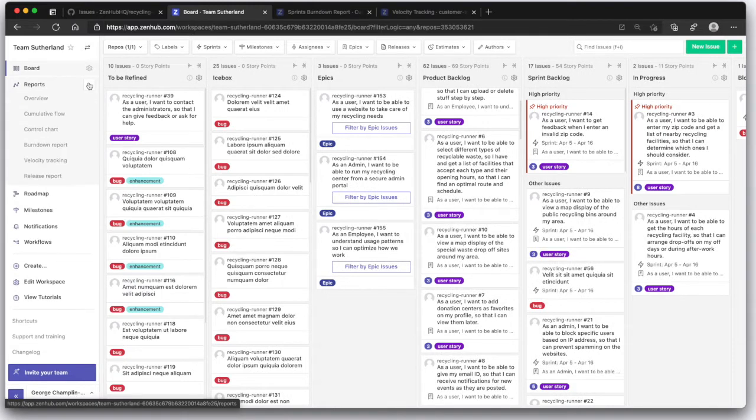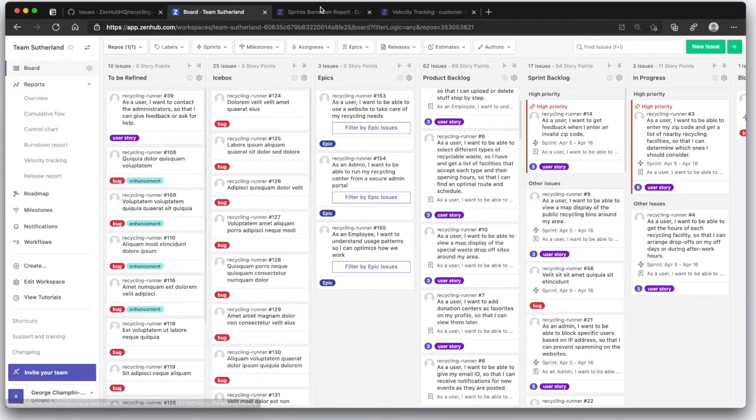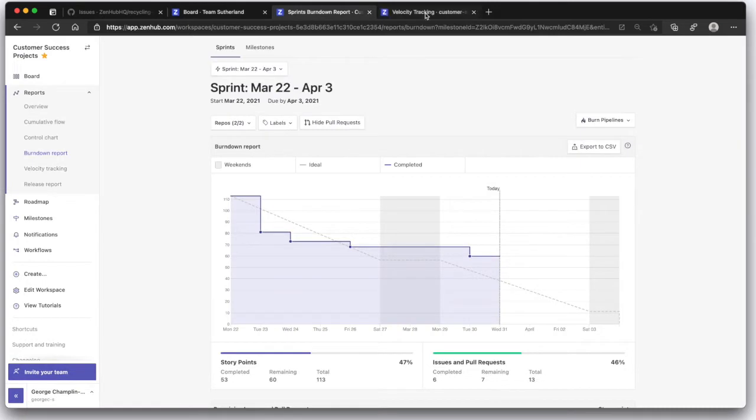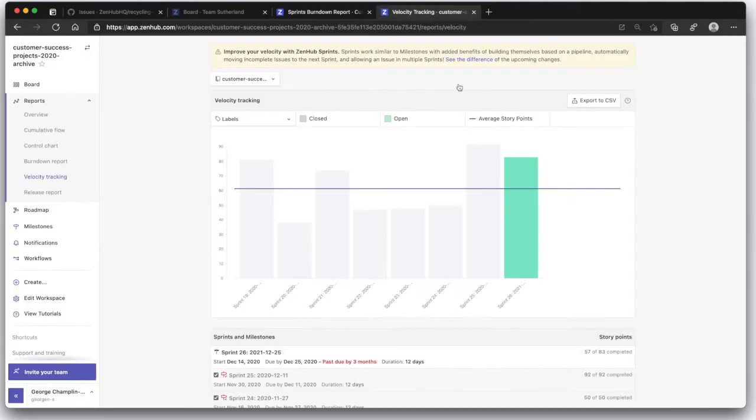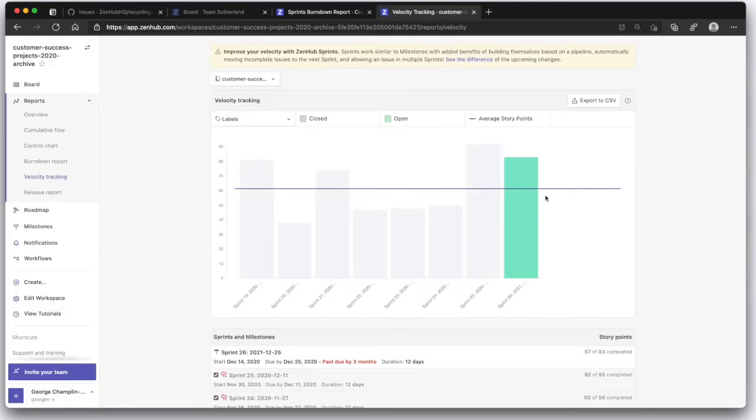Our sprints are tied in with the reports, so you can quickly see your burndown and velocity and see exactly how you and your Scrum team are doing. When it's time to plan the next sprint, you can check out what your average velocity is so that you make sure you don't overcommit.